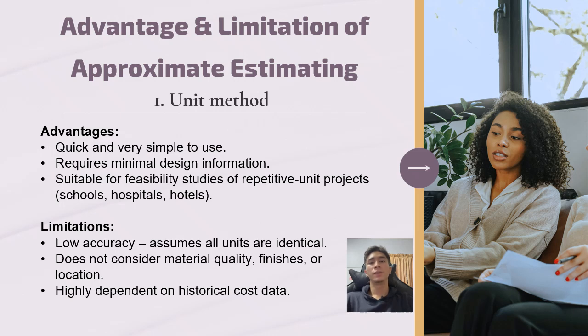However, its limitations include it is less accurate because it assumes all units are identical in size, quality, and specifications. It does not consider material quality, finishes, or location factors. It depends heavily on historical cost data, which may not always be current.